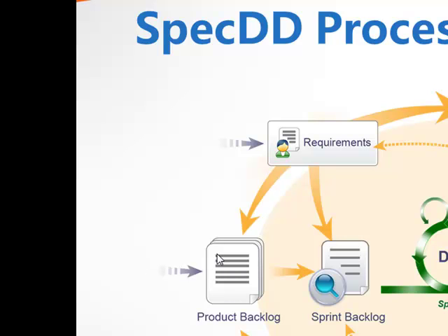Why? Because that is where the product owner can then review these defects, prioritize them, make the necessary changes or updates, maybe provide some additional detail as to what the bug is and how to fix it. And then once the product owner has reviewed it and is satisfied, he or she can pass it along through the sprint backlog to queue it up for the next sprint.